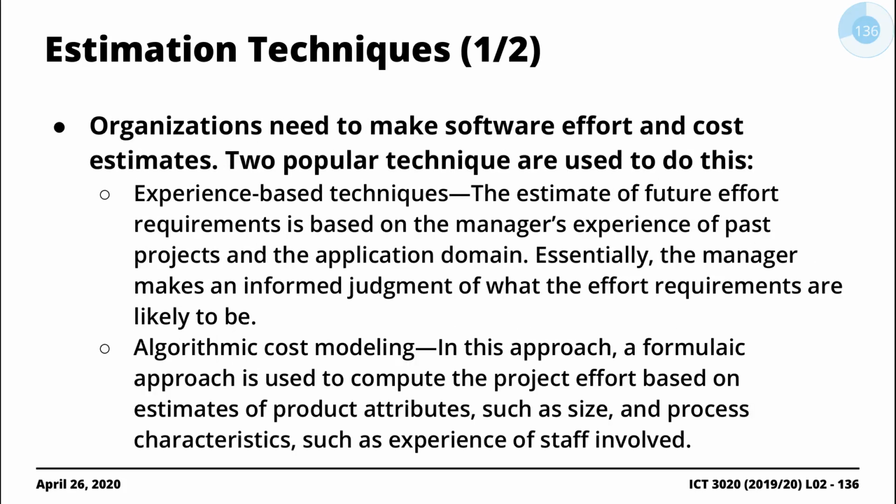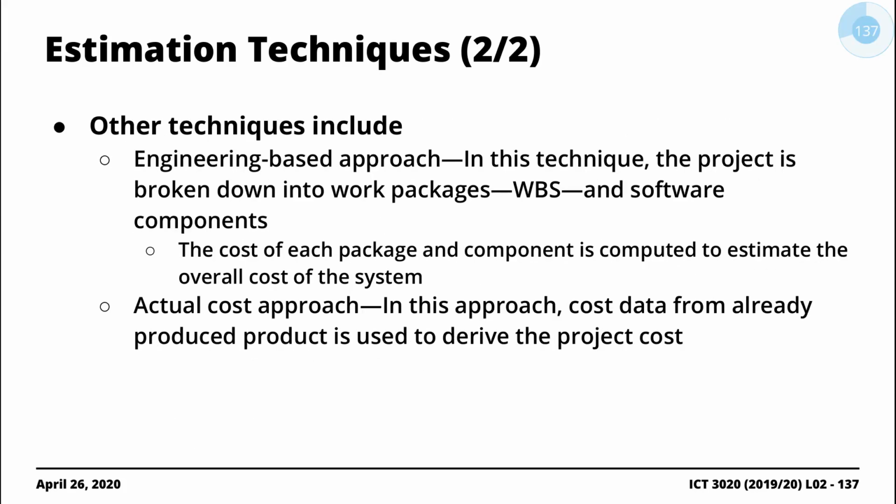But besides the process of using analogies and statistical techniques, you can also take advantage of so-called engineering-based approaches and actual cost approaches. In the engineering-based approach, you take a bottom-up approach where you break down the project into smaller manageable components, and then you try to approximate the cost associated with those different components. After you do that, you add up the cost, and then you come up with a relatively accurate estimate of how much the project would cost.